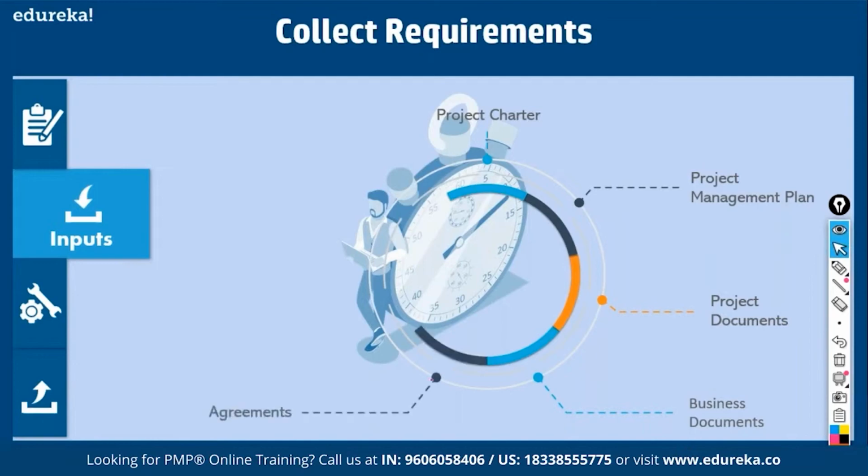Then agreements, what are agreements? See, agreements are the agreements that you enter into with the customer. See, when you get a contract, let's say you're ABC company, you get a contract from XYZ company to deliver a product. So the customer would have entered into an agreement with you. The agreement would contain a statement of work. What is a statement of work? A statement of work is a narrative description of everything that you, ABC company, must deliver as part of the project. So it contains all the requirements. So you look into agreements as to what you have to deliver. That will be the basis for collecting requirements. You have to go and talk to the stakeholders based on this statement of work and amplify the requirements in a much more detailed manner.